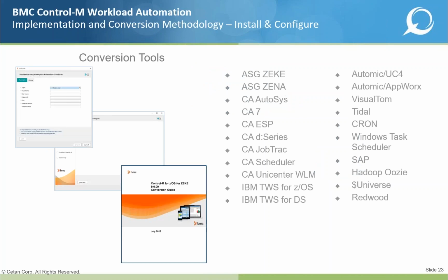And then also, we know that at the application level, there may very well be specific blackout dates or resource constraints that need to be included in the timeline and plan, as well as things that might be on the horizon. Maybe a big data activity or some other upgrade to a database or server farm that needs to be factored in. So those are also all things that we grab and factor in.